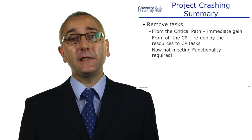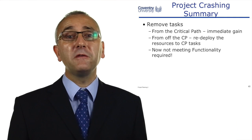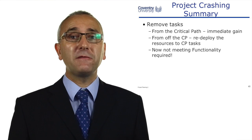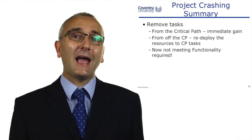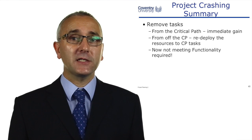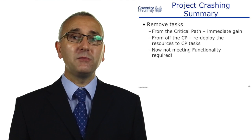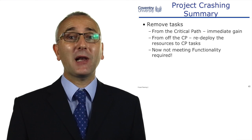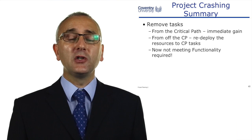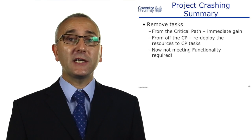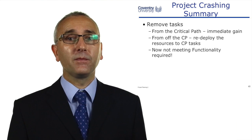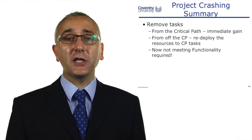Finally, to save time on the project, remove tasks. It has an immediate gain if you take a task away from the critical path. However, you're now not delivering the functionality of the project — not delivering the objectives as originally planned. So somebody is going to have to authorize that decision to de-scope the project and remove that functionality in order to save time. And that's project crashing.